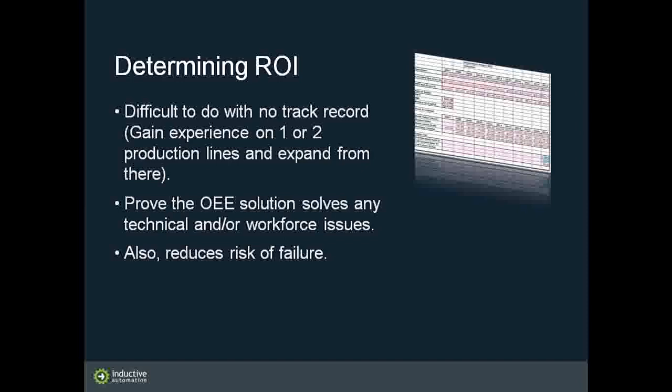You'll probably learn some things about your company and the workforce at your company. You'll make sure all the technical issues can be solved and you can accomplish what you want. And that's the bottom line there: it reduces risk. So you're not putting an implementation across the entire plant and then finding out you need to go back and make changes, or it doesn't work out so well in your facility. So there's a kind of risk analysis here. Start out, learn from one or two lines, and then start rolling out to other lines.